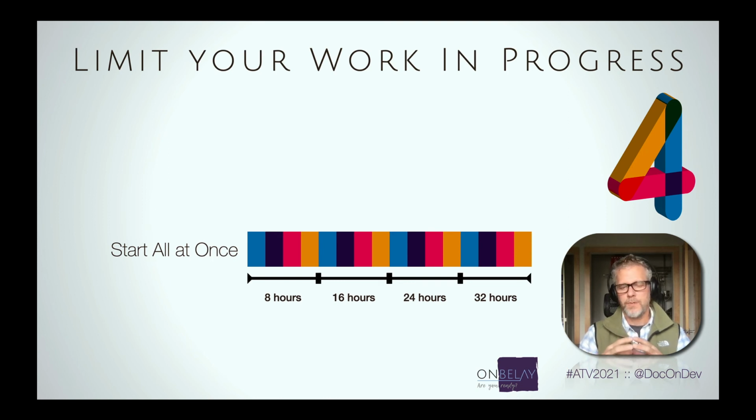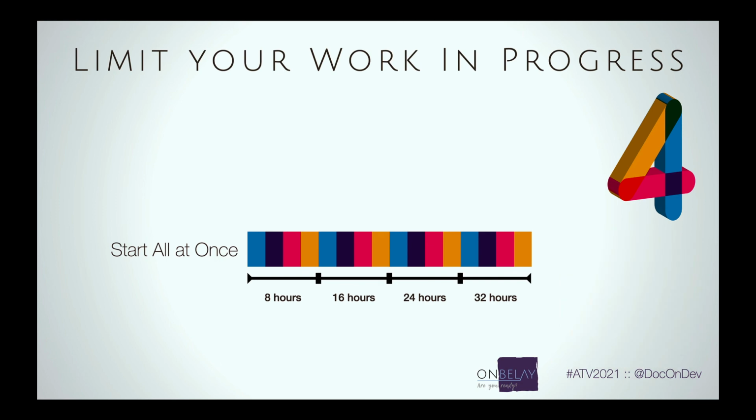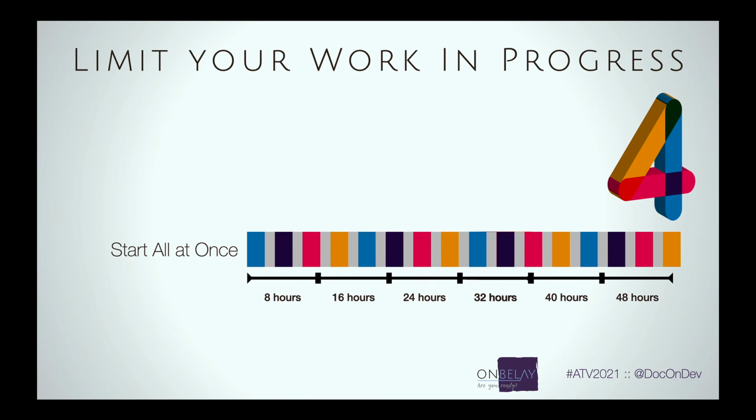This tax is about 20% for each new item, which means that it's fundamentally compounded. So in reality, these items would take 48.75 hours to complete. All four tests would not take 32 hours, but would take 48.75 hours. And for those of you paying attention, the first task, which is the blue, doesn't finish until past the 32-hour mark, where we originally thought all of them were going to be done. So nothing is completed until after we thought all of them were going to be completed.